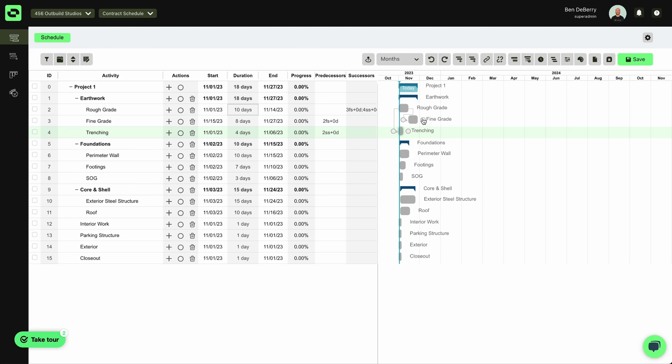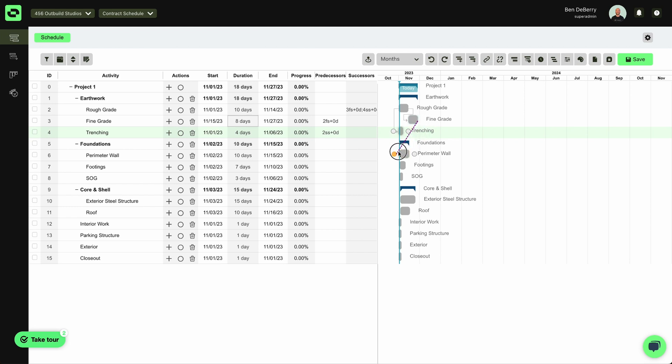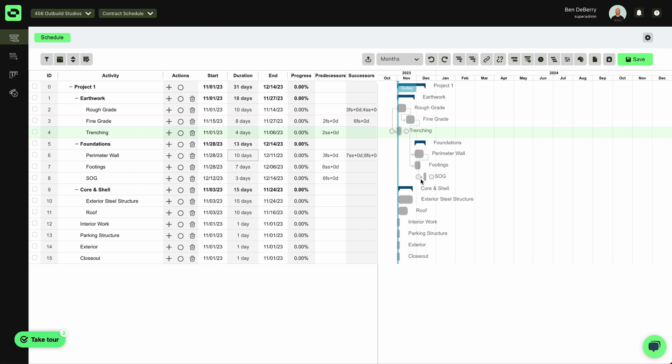From there, after my Fine Grade, we can start worrying about our perimeter wall. We can start our footings at the same time. And then we can do our Slab on Grade after that.